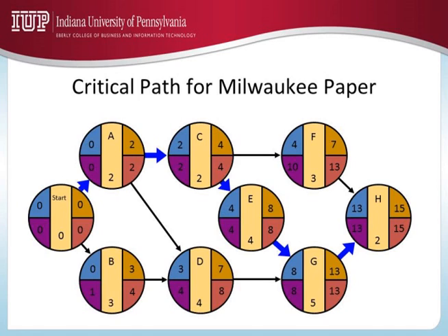D. Now D, when can you start earliest? What do you need to do? What do you need to look at to decide that? You gotta have A and B both completed. Look at these arrows. Both of them need to be completed. I am done with activity A at the end of second week. Can I start D at the end of second week?